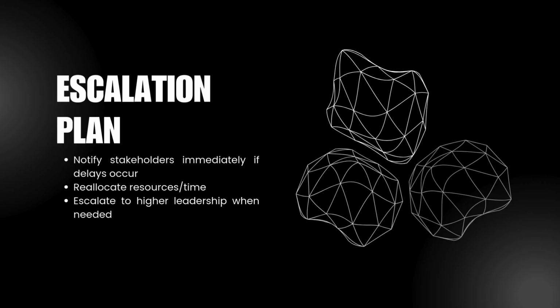For escalation, my plan is to notify stakeholders immediately if any milestone falls behind schedule. Time is money. If necessary, I'll propose reallocating resources or adjusting timelines accordingly. And if risks become more significant, I will escalate them to higher level leadership who can potentially provide additional guidance or resources to keep the project on track.